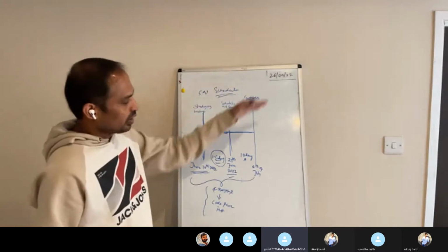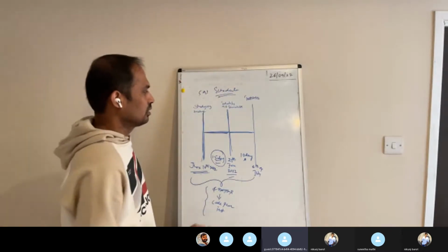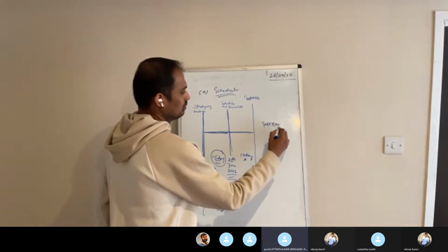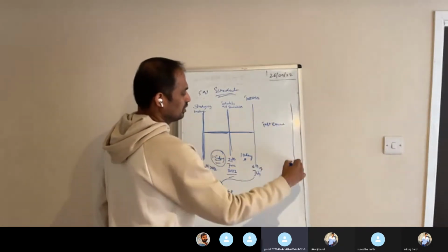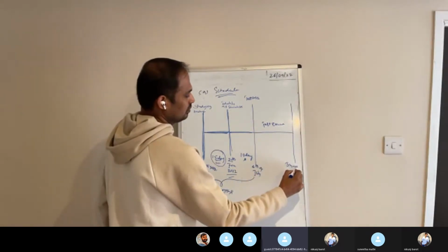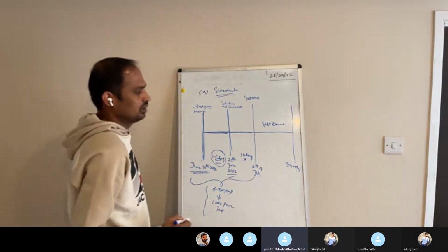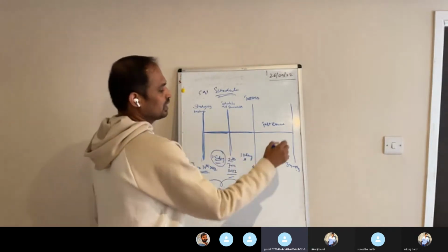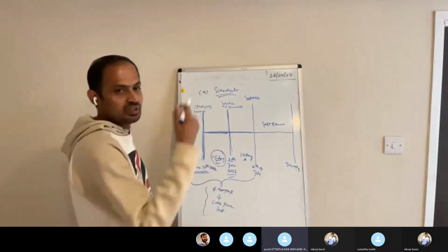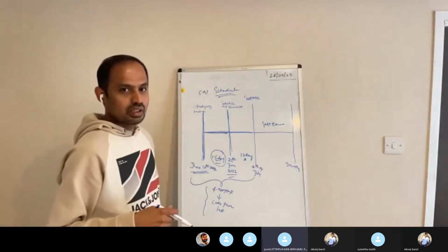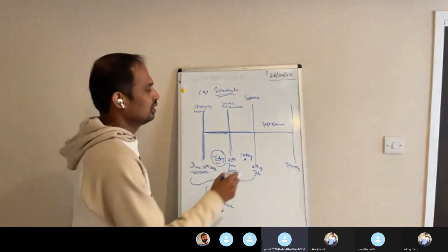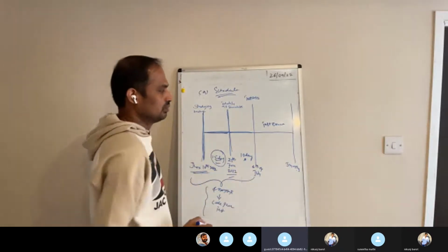So meanwhile, the product will be delivered to us to test it. So we'll start test execution. Test execution will take 3 months. In these 3 months, we're gonna test. If you have any defects, we'll send it to the developers. Developers will fix it, and we will get the fix again. Then we're gonna retest. So this whole process will take 3 months.